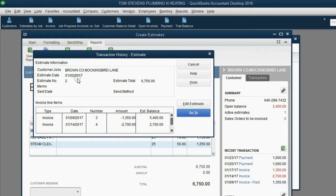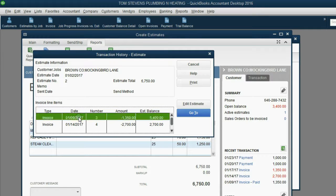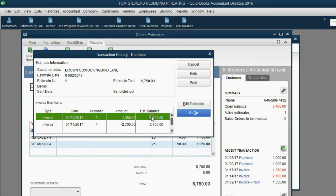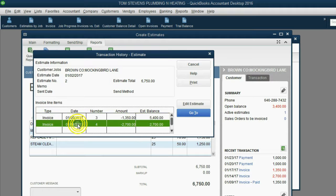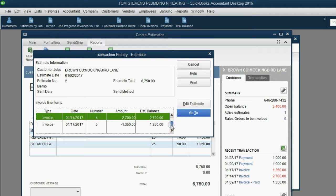For example, January 2, the balance of the estimate was $67.50. That was the unbilled amount. Then, as of January 9, because January 9 we billed them with invoice number 3, the balance of the unbilled amount went down to $5,400. January 14, we billed them again with invoice number 4, and the balance went down to $2,700.